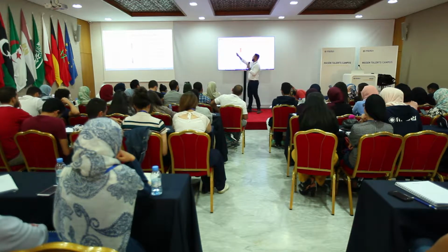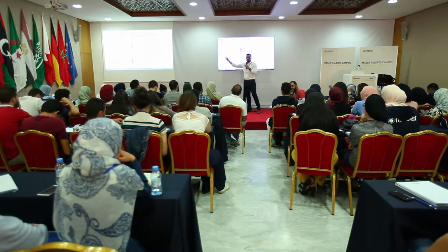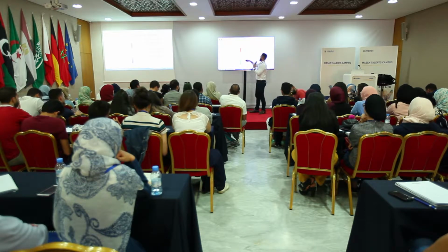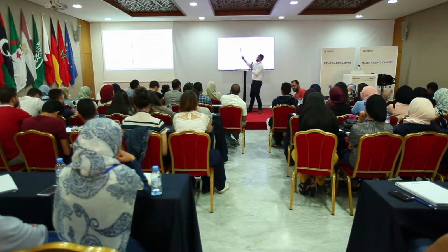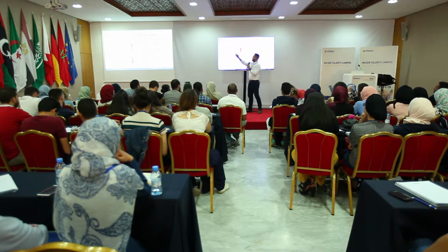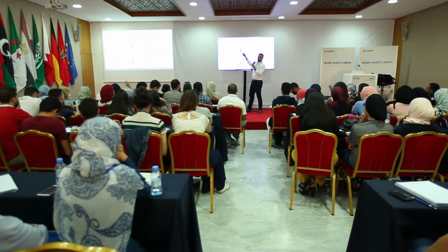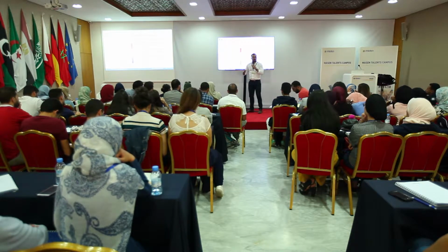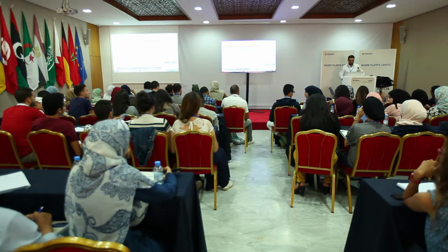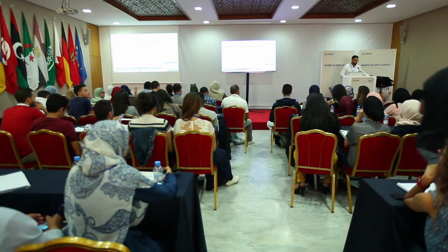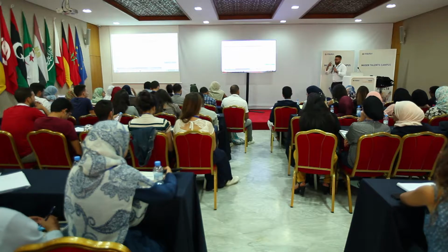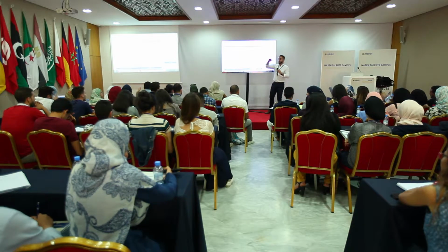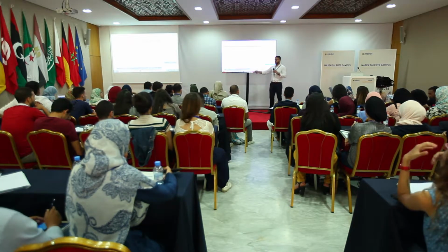A development company, usually called an SPV, or basically a project company, which is a consortium made up of a developer together with a tech owner and an engineering firm, says, we are going to bid. This is led by the development company, which makes money on building projects. They prepare a proposal, they submit the proposal, and the government evaluates the proposal. After evaluation, if one proposal wins the project, then there is a whole phase in which, to do this, I need to get the financing. And this is a very important step because at this stage, they're building a project with their own money. They prepare all the works and so on, engineering, pre-engineering, without having been paid anything.